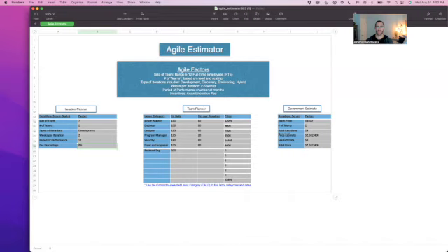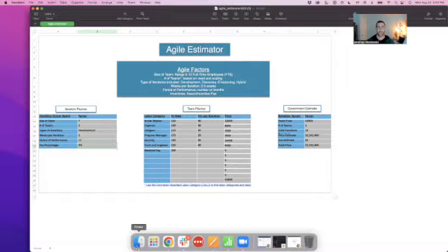So really simple and straightforward. It doesn't matter if you're doing this for time and material or firm fixed price or fixed price per iteration, because at the end of the day, what you want to line up is how the total price lines up. So if they broke it up differently, 3 weeks, 6 weeks, it really doesn't matter. This is just giving the government an opportunity to assess, budget, and plan what this program should cost. And if the contractor's price comes in different, it doesn't mean they're wrong or you're wrong. It just means they probably made some assumptions that you didn't, and that's part of the negotiations, and that's part of the fun.